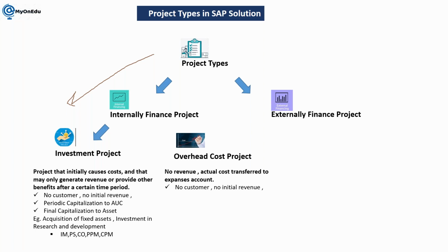Okay, and as per the government policy, when you are constructing anything in that particular area, you have to provide education to all the kids who are staying nearby. Okay, because of some policies, or sometimes like labor kids, you have to provide the education. So this is the direct overhead for you. You are not directly going to get anything.